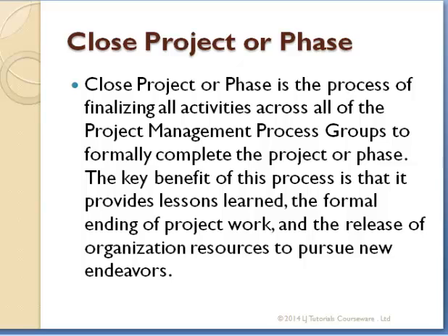Okay, now what are the inputs? Before I go further, what do we do in closing a project? In closing a project, you come back to your client, say you wanted a duplex at Cielo. You come back and meet him. We have finished our work. Please verify that this is what you need. And if he accepts, you can close the project. Then you also return all the tools that were assigned for the project back to the designated office.